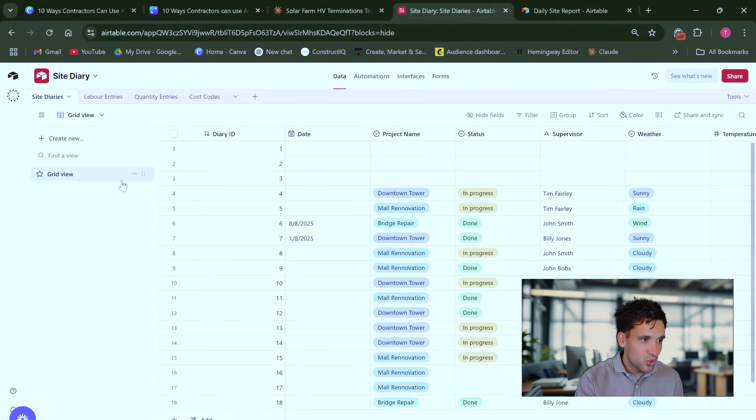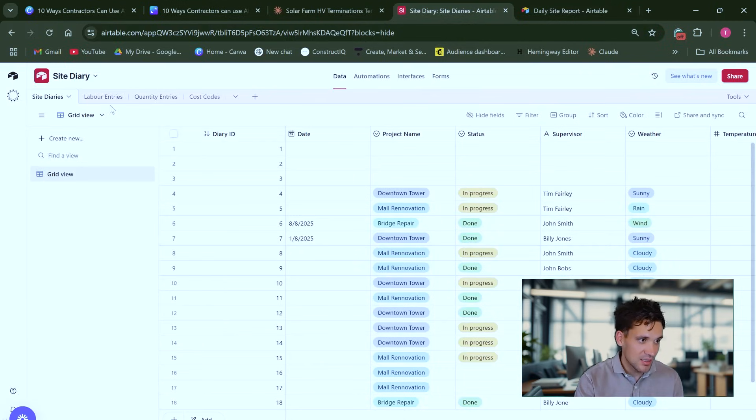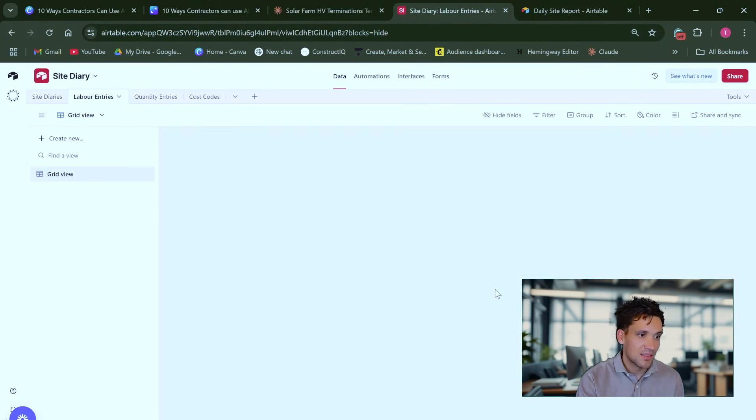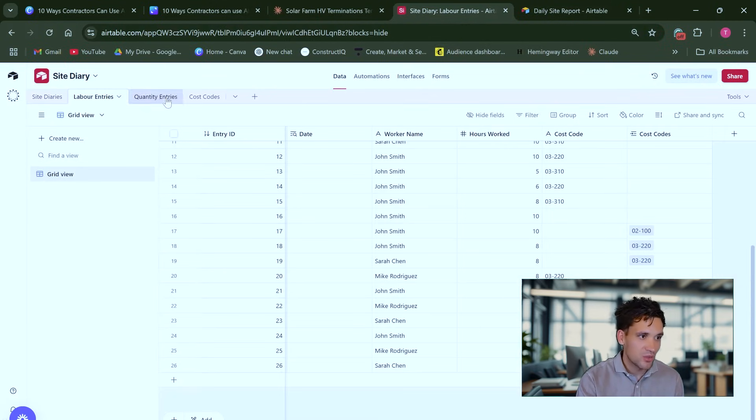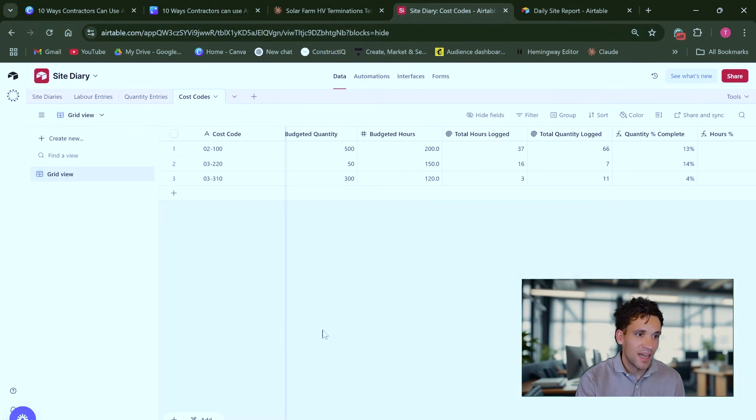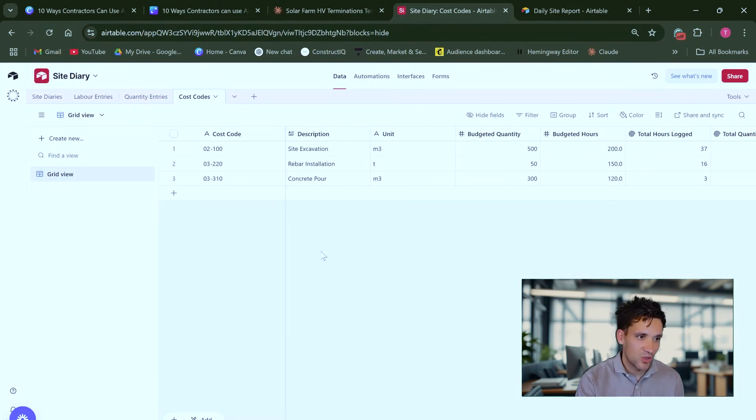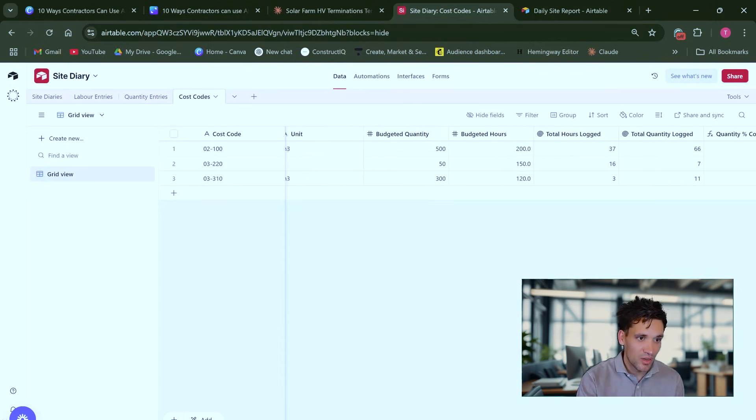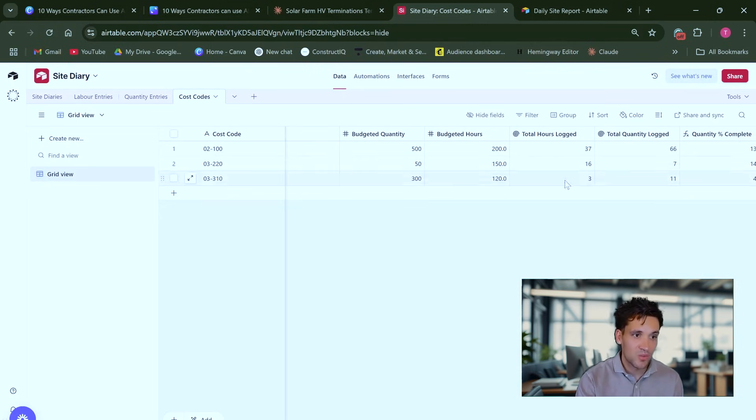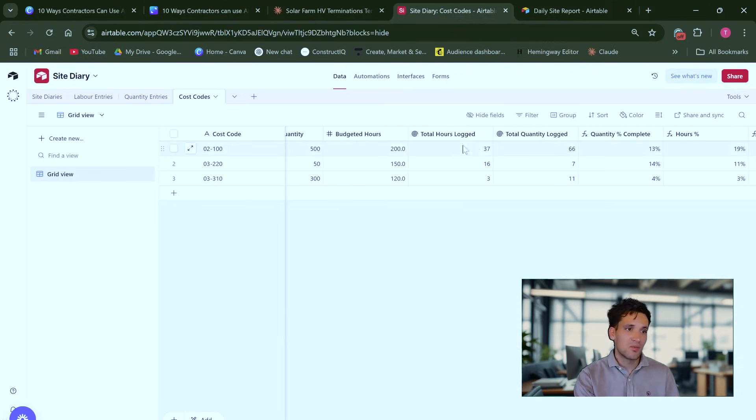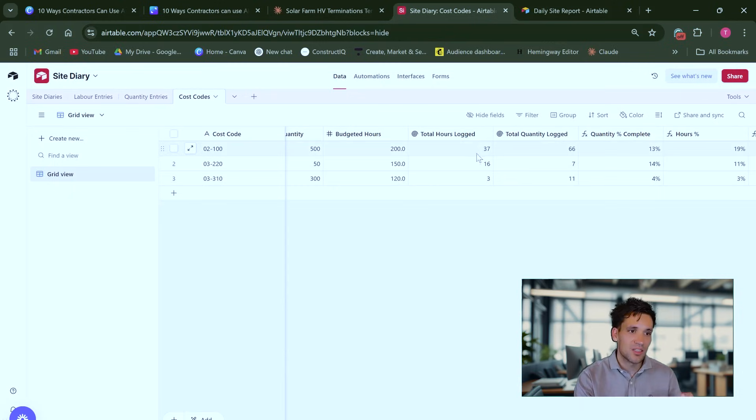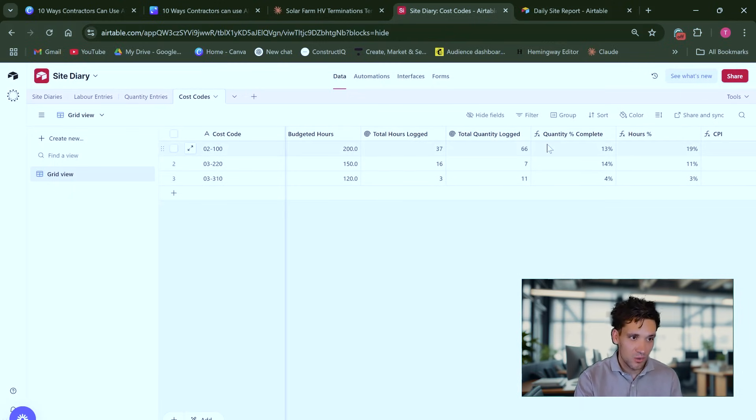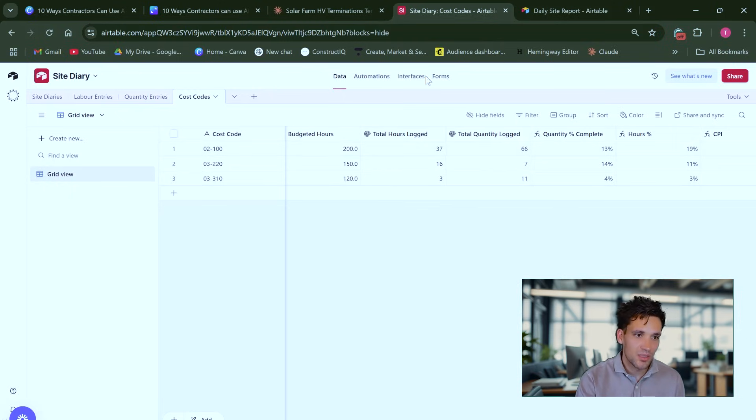It stores all this in a series of databases. So we've got the site diaries, all the labor hours tracked, all the quantities of work recorded, and then it sums this against each of our cost codes. So we might have a cost code for site excavation that has a budget quantity of 500 meters cubed and 200 budgeted hours. And each day when people log their timesheets, it tracks the hours worked against each cost code, the quantity completed, and then it reports the quantities logged. So the percentage complete of quantities and a percentage complete of hours used.